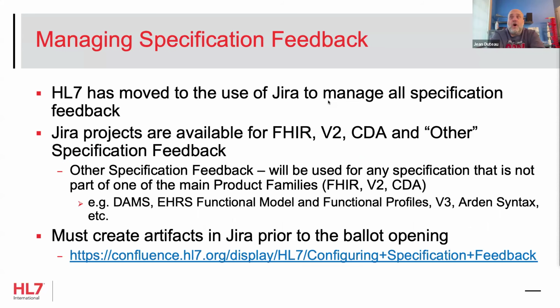Jira projects are available for all of the different specifications, right? So issues can be raised against them all the time. And then those issues can be voted on, right? And so again, that's the easiest way, is in Jira. And we've provided the ability to create dashboards for a specific specification. I just did that the other day for a dashboard for something I have, a FHIR IG that's gone to ballot, my DaVinci postable remittance, and it was quite easy to do. There's a dashboard wizard, and we've got a link to it on the essentials page, and you just pick the project and what information you want included, and boom, you get a whole bunch of really nice charts and stuff. So that's great.